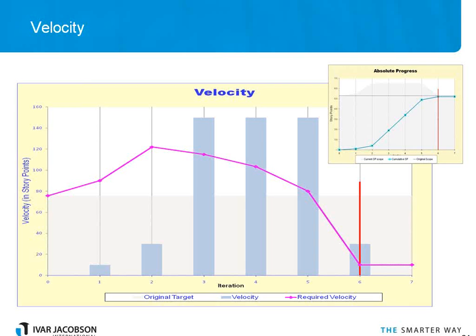Because of our slow progress in the first 2 iterations, you can see that our average actually went up, but because of those 3 highly productive iterations in the middle, the velocity has started to come down. And we're far exceeding the velocity we need at the end. So in that 7th iteration, we may well exceed the published scope.